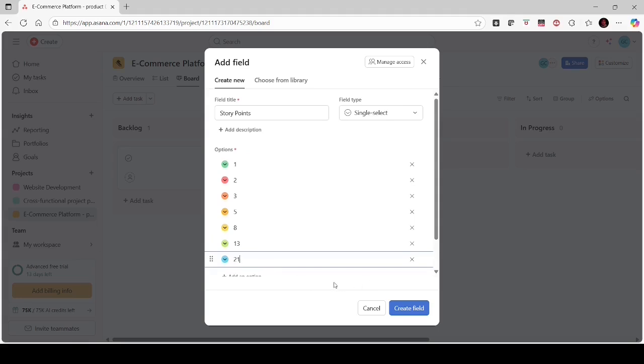Maximum till 21. But one point is that if a very large story point is there, it is recommended that it should be broken into smaller pieces so that it can be managed effectively. Otherwise, a bigger story point associated with any story means it is a very big piece of work, and there is a lot of associated risk in completing it. To avoid that, it is always recommended that for any big piece of work, we divide it into small pieces.